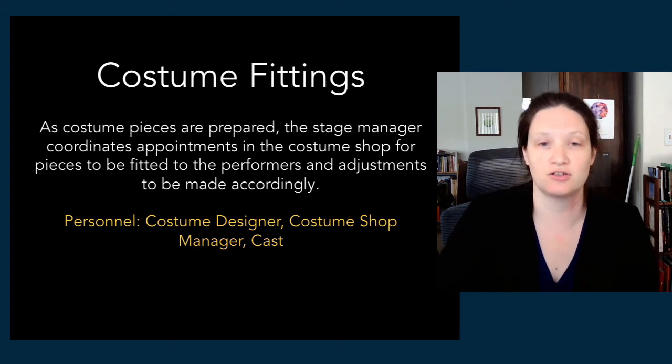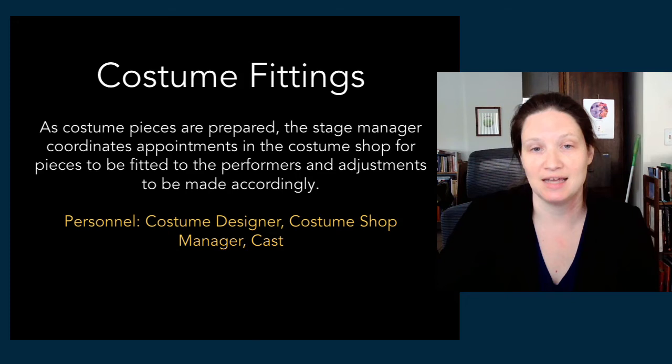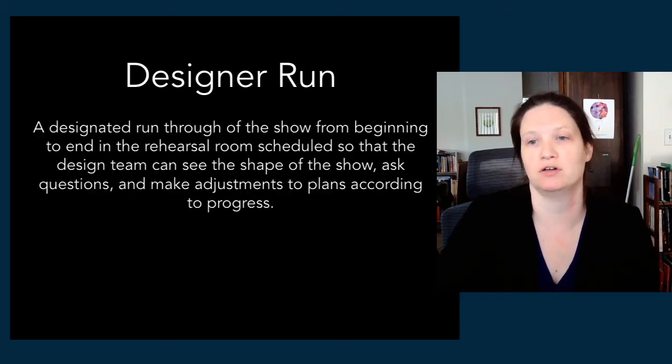So this is your costume shop. Costume designers will typically be present at these fittings, and then the cast of the show is scheduled by the stage manager. Once the show has been fully staged, there will be a designer run, typically, and that is scheduled generally, we hope, 2 or 3 weeks before we go into tech rehearsal.